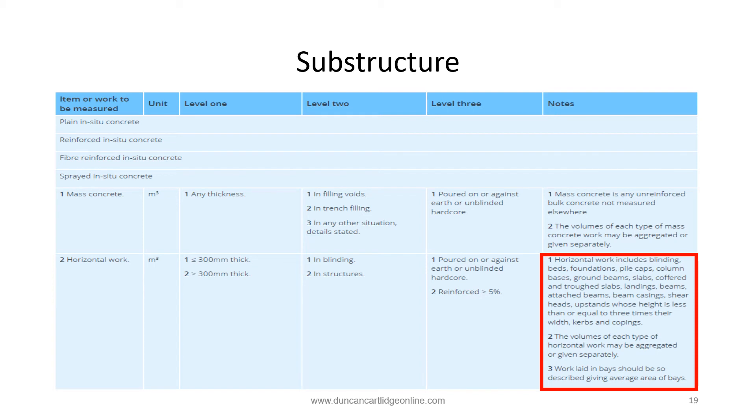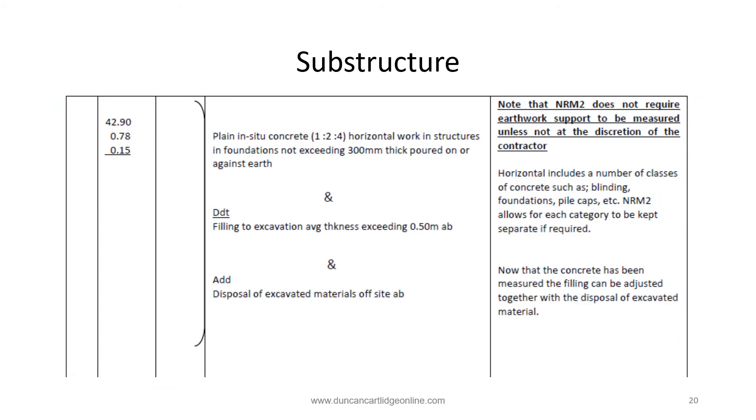In situ concrete work is another work section where the taker off has alternative approaches to describing items. The foundation may be described as horizontal work or foundations as notes and comments. Note that the concrete work is poured directly onto earth or unblinded hardcore and this has to be described. The reason being that concrete is deemed to be poured into formwork and pouring on earth will require more than the net volume of concrete as this method of placing is so imprecise. The estimator should allow a percentage addition to the bill of quantities to allow for this.